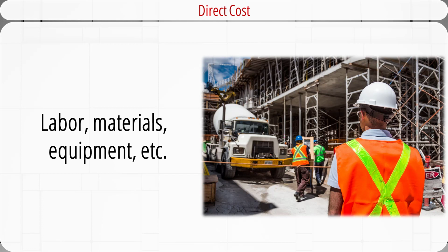When estimating the cost, we need to consider all kinds of costs found in a project. Typical cost components are the direct cost, the direct overhead, as well as the general and administrative overhead, sometimes called the indirect cost. The direct cost includes those that are clearly chargeable to a specific work package. They represent real cash outflows and must be paid as the project progresses. Examples are labor cost, material cost, equipment cost, etc.